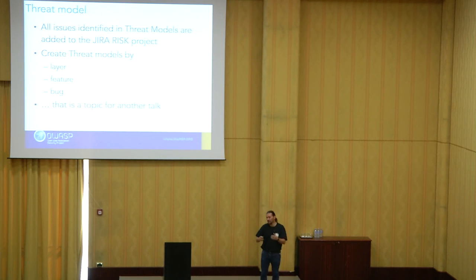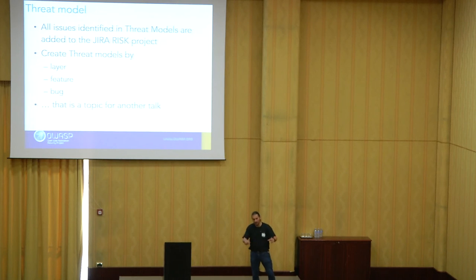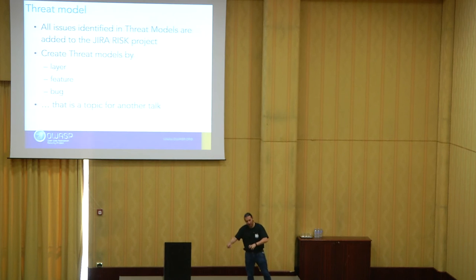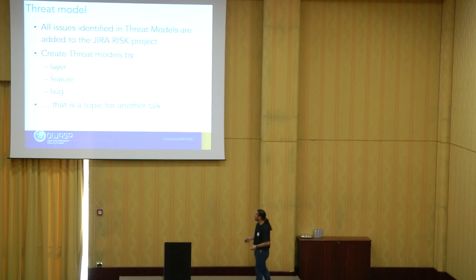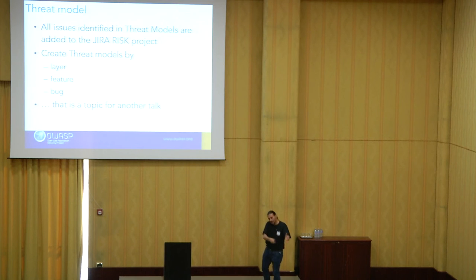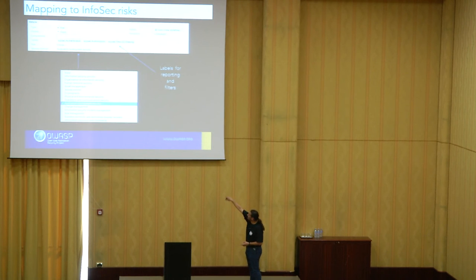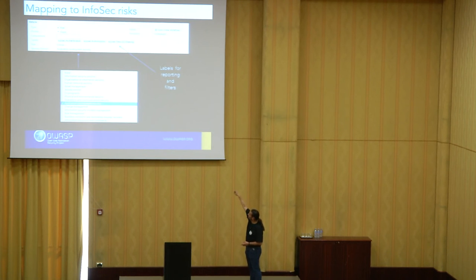Threat models are a massive area where every issue identified is added to the Jira risk project. These days I create threat models by layer, by feature, and by bug, which works really well. I sit with devs, they write the threat models, we digitalize them and come back to them. We tend to use draw.io — it saves in XML files. All the threats we find are mapped into Jira, where you can add labels and use all sorts of interesting properties.